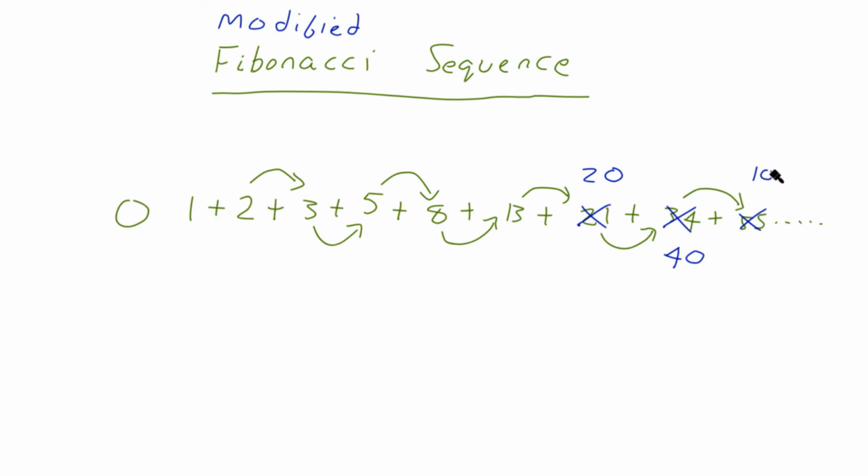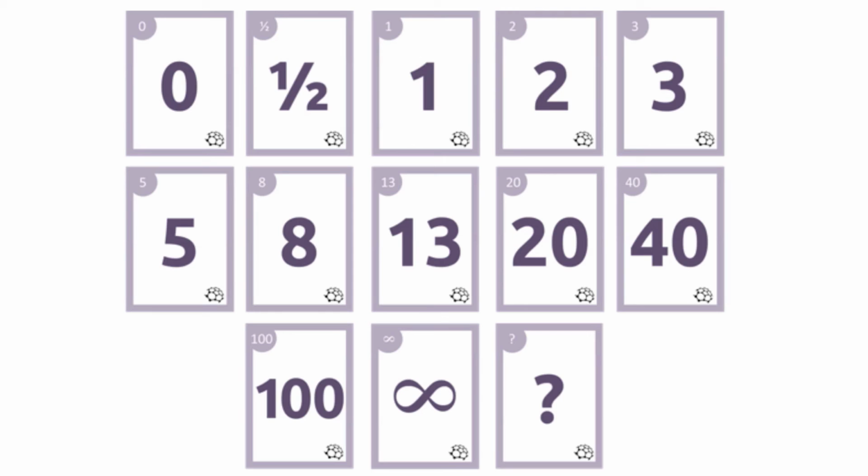So let's quickly come back to the card numbers before we close off this lesson and look at some of the special cards. So a card with 0 on it implies that the story is already done, or it's pretty much nothing left, just a few minutes of work. And a card with a question mark means that the developer has absolutely no idea at all, and this would need further discussion or further clarification. And then finally, the card with the infinity symbol is a way of showing that you feel that the story cannot be completed in the sprint.